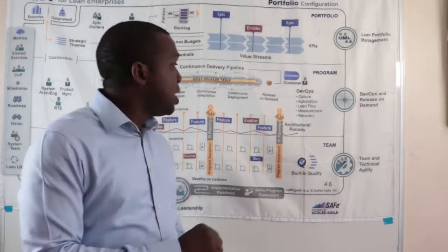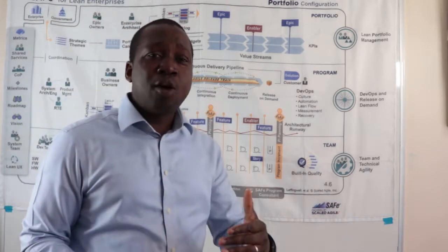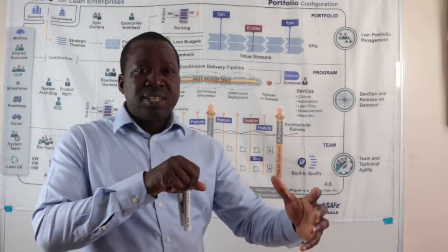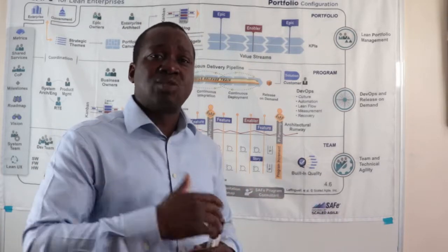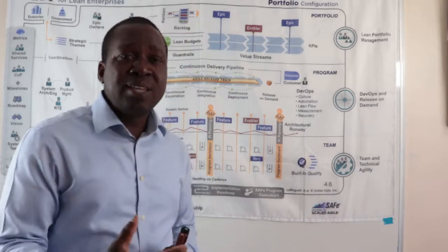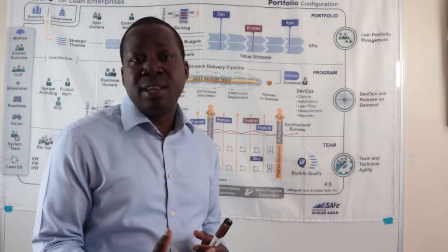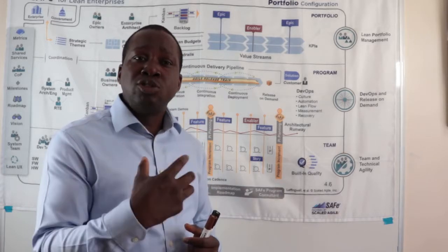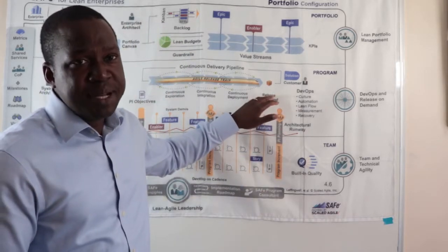At the end of the integration process, the teams need to have an environment to be able to deploy. And here we would separate release from deployment, and we will separate our various staging environments so that we can deliver when the customer expects it. And this is based on the fact that our customers are not always available and they are not always ready to take our solutions or to start using our features. So we are working on the concept of releasing on demand.